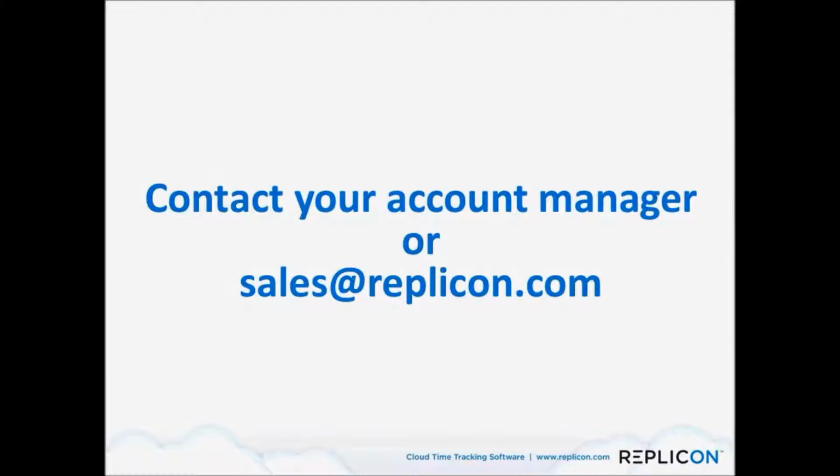There's another question here from Linda. If a user is not resourced for a project, can they add hours to that project? They can. Common question again with the other customers that I've gone through Gen 3 with. They can still add time to that project. Often, all of us work on projects that we weren't originally spec'd to work on. And the system isn't going to prevent that unless you want it to. Group assignments within projects still allow other users to enter time towards the project. It's simply those specific resource assignments that will let us allocate users and track their allocations versus their actuals. So yes.